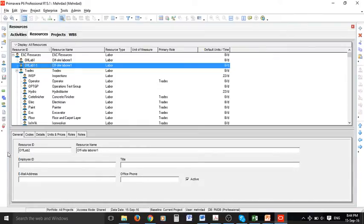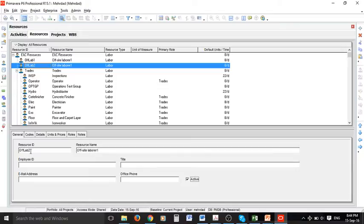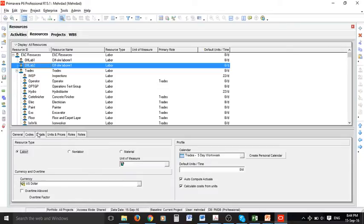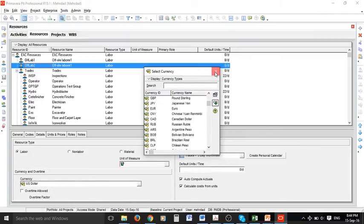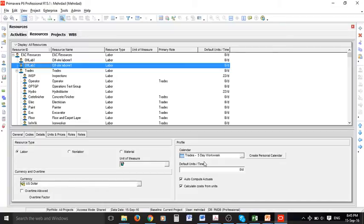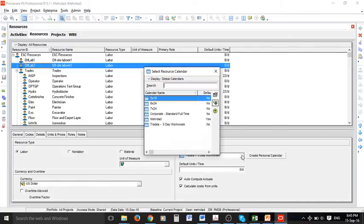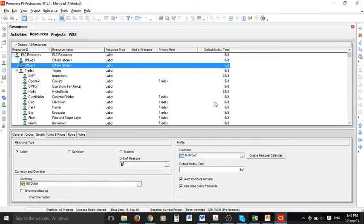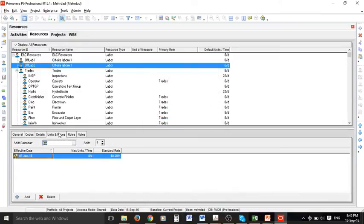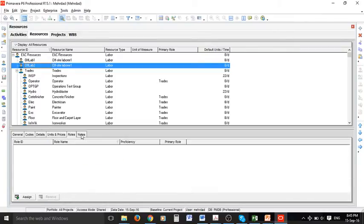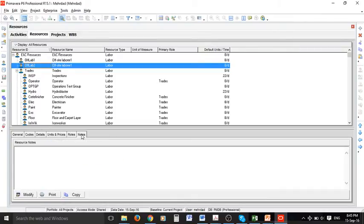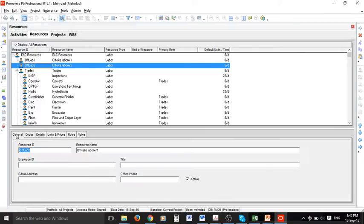There are different options - it should be an active resource so this box should be checked always. In details we can see it is a labor type and we can change the currency to whatever you want. Another option we have is to change the calendar and remember we created the calendar for this project so we can choose that one. In units and prices by default we have eight hours per day for this resource which is okay. Roles and the nodes for this resource are in here.